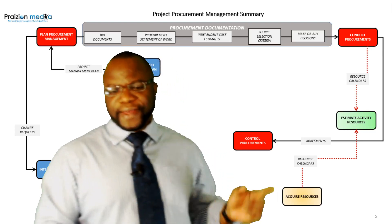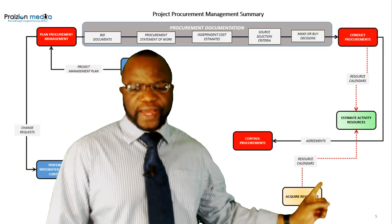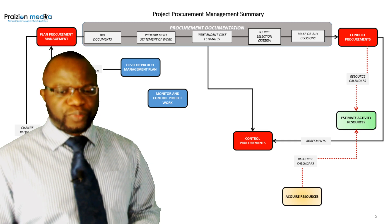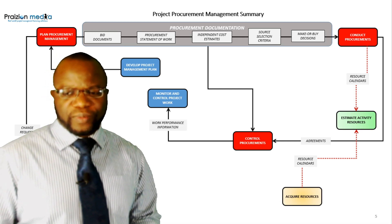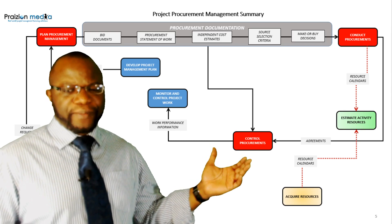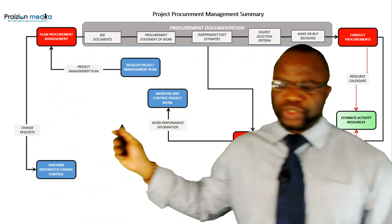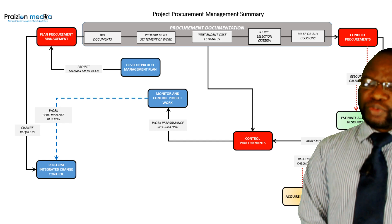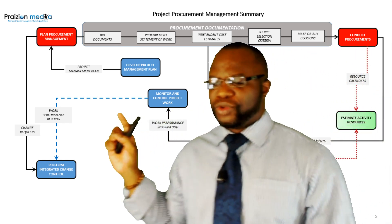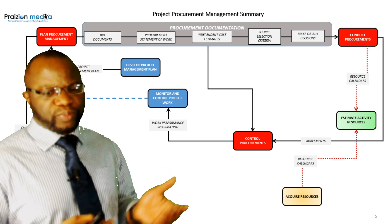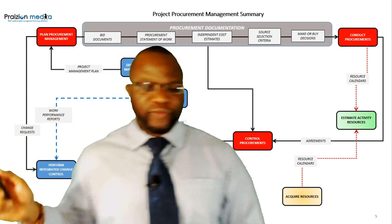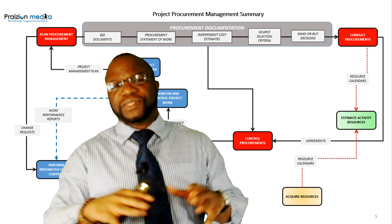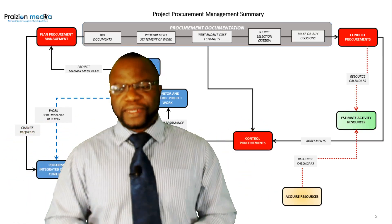From Control Procurements we get Work Performance Information, as we do from many other processes — WPI goes into Monitor and Control Project Work. We also have work performance reports coming from Monitor and Control Project Work; they go into Perform Integrated Change Control. So you can see work performance reports going into Perform Integrated Change Control — that's in a different knowledge area, but it's good to see in the bigger picture how all these things interconnect and flow.